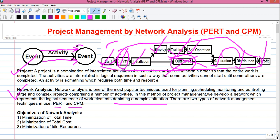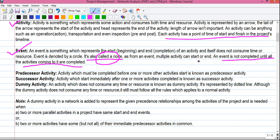Until all three representatives travel to London, the survey activity cannot be started. At that event, three activities are ending, so until all three are done the next activity cannot be started. An event is called a node because from an event multiple activities can start, or to an event multiple activities can end. These are the three key points you need to remember.